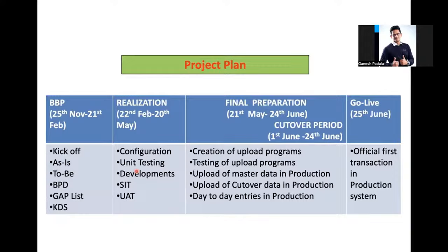Cutover-related programs we also have to start making in realization, because in most cases 70 to 80% of data will come during UAT time. So we need those customization things also. The creation of upload programs we can do well in advance, during UAT time also. So testing of upload programs and upload of master data, these activities will happen. Realization and final preparation are closely connected, so certain activities will come and overlapping might happen.